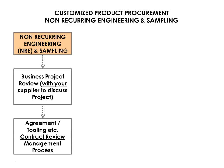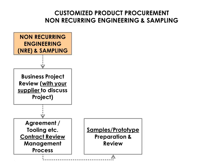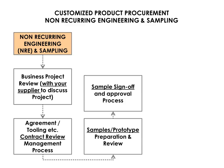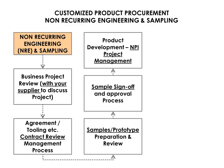The next step is to start working on an agreement or contract for all of your non-recurring engineering items. In parallel, you need to start the prototype and sample process. This is where the supplier will work on producing samples to your specifications in order for you to review them and make changes where required. Once you are happy with the results, you should approve and sign off the samples as acceptable. Your new product introduction plan should be updated at this stage to reflect any implemented changes that may impact on the plan.